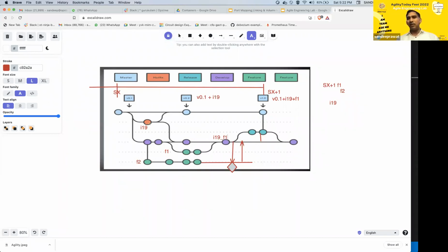If you have a very clear understanding of this diagram, then you can enable your development team and ask questions like, why are you not doing feature development? Why are you not doing parallel releases? This is the most important aspect, in my opinion, for agile coaches, Scrum Masters, and product owners. You can say, though you will not be able to deliver everything, let's do parallel development and maybe deliver 8 things out of 10, instead of saying let's stretch our timelines or shift our sprint. That should not happen. Whatever you want to deliver at the end of the sprint, you should definitely deliver, maybe not fully, but partially, right? This diagram is very much useful, I can say.